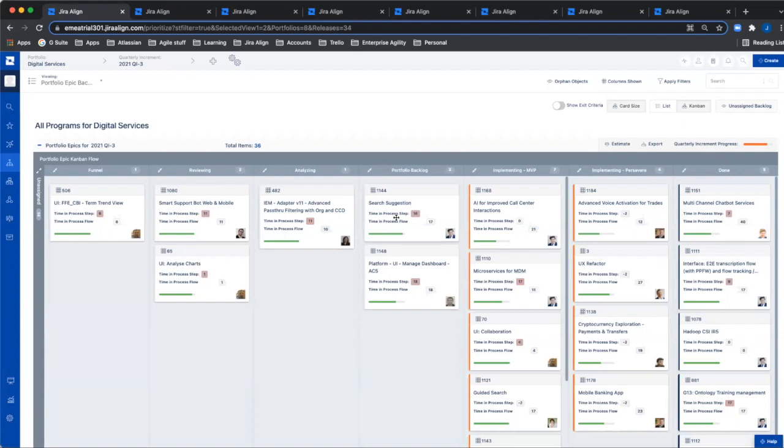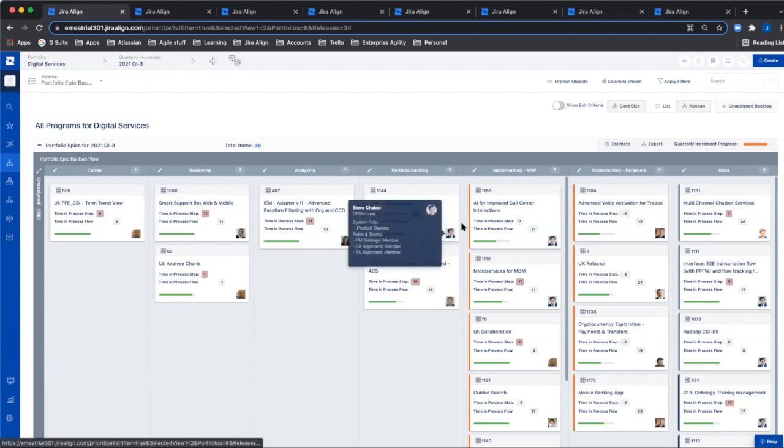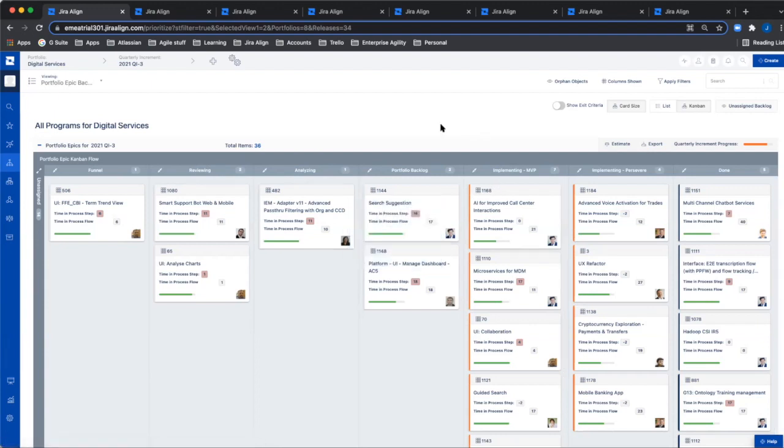So it's important to set up those process stages, start simple, and then use mechanisms like the average time in process step and time in process flow to identify that. That's super neat, to have that detailed ability to see that specific step, but also the overall flow. Absolutely.